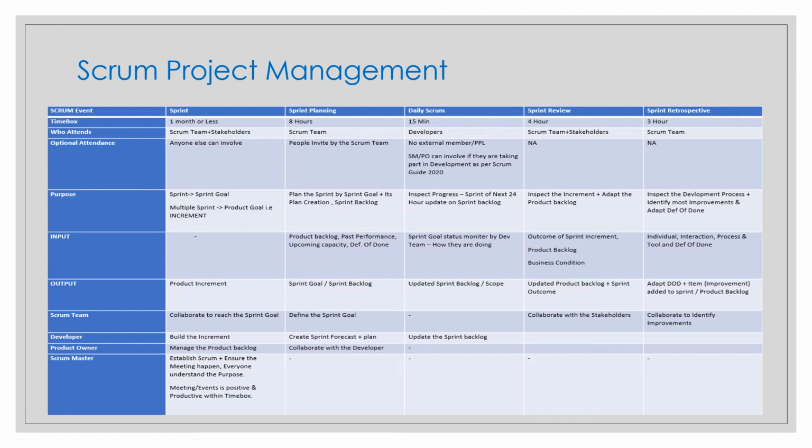So acceptance criteria apply to a single PBI, while the definition of done applies to every PBI and the entire product increment.